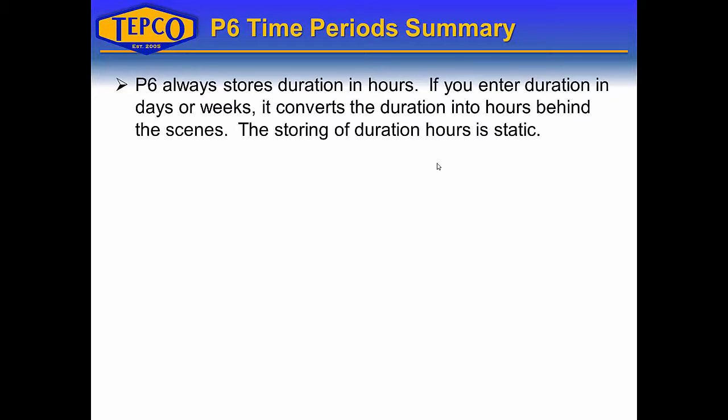First, P6 always stores duration in hours. So if you enter your duration in days or weeks, it will convert those durations into hours behind the scenes based on the time periods that you have set up, either under admin preferences or if you are using the calendar time periods, it will do the conversion based on the calendar time periods.